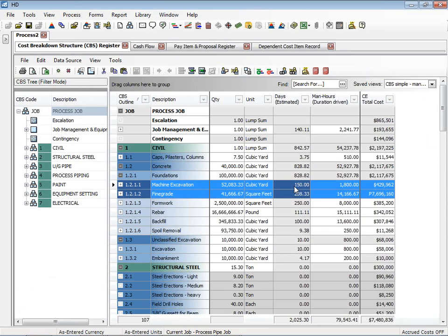HardDollar has already accounted for that in the cost model, in the estimate. So that change has increased our cost that you see out to the right. By the way, all of these things are in US dollars, and that one item there we're actually measuring in another currency, in pulas in this case. That's really there just to show that we do support multiple currencies. You can mix and match currencies in the same project. It all adds up and gets converted to US dollars in this case at the bottom.